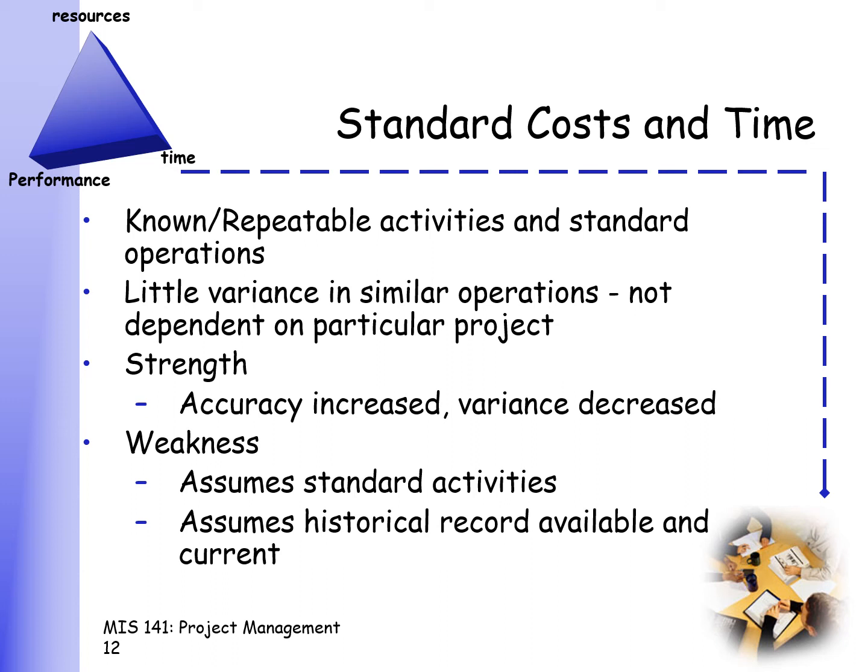Now, the strength here is that the accuracy really is increased because you have previous historical data to back you up. The weakness, though, is that, at least in the Philippines, there's very little historical record to back you up. Okay? The other weakness is that it also assumes that everything is standard.